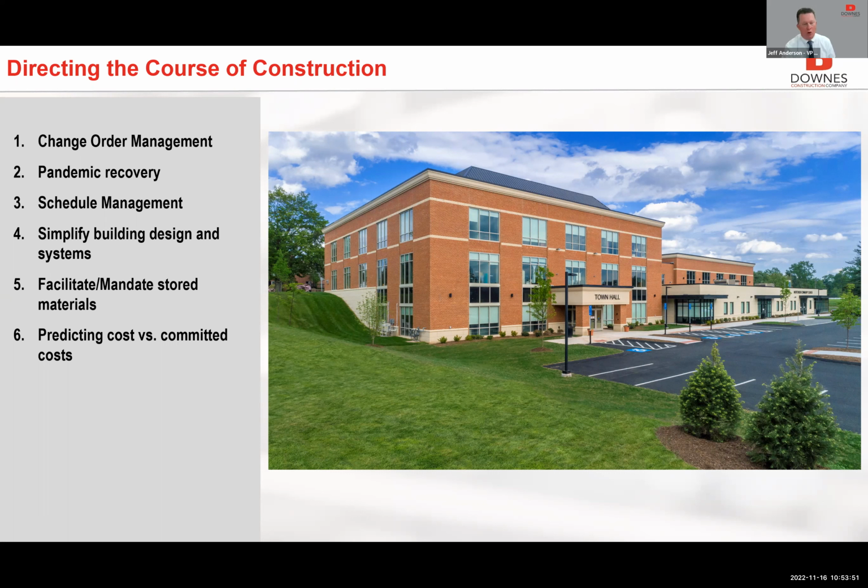I can think of a particular town hall project, not the one we have on the screen, but a very similar building, where a municipality was going from an existing structure built in the 30s or 40s, and the purchasing department had a certain amount of square footage that they were used to within the building. They assumed that we're just going to need the same exact amount of square footage in the new building that we're constructing. So we became a little bit over budget at the DD level and went back to them and said, okay, let's look at some of these square footages. Is this as efficient as you really need it in today's modern municipal building? And we were able to pull back some square footages without sacrificing anything from an operational standpoint at that particular municipal structure.